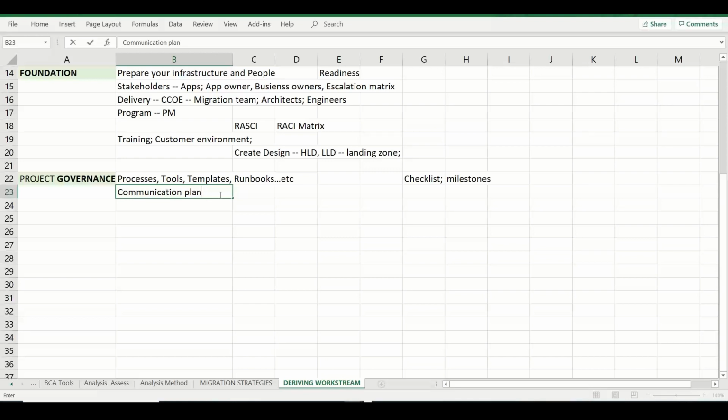Okay, you have to have your rules, you have to have your boundaries, which systems you need to touch, what time you have to touch them, the maintenance window. So all these are very, very important. And escalation procedures are very, very important in project governance. And they will also have a template maintained for the RAID log.